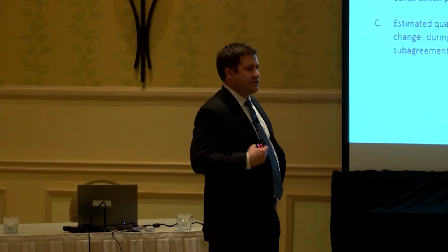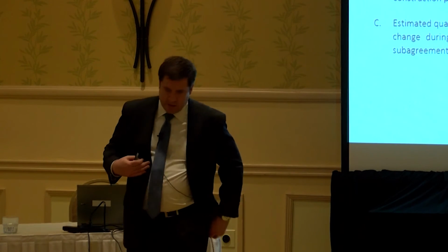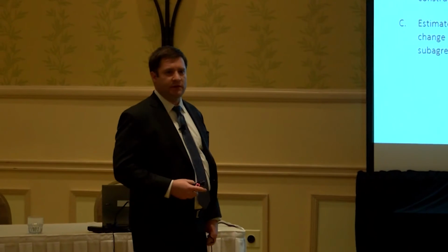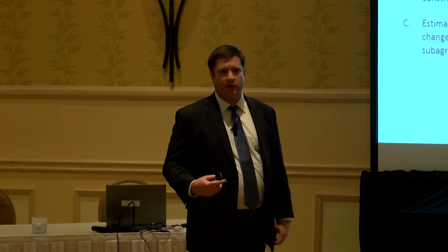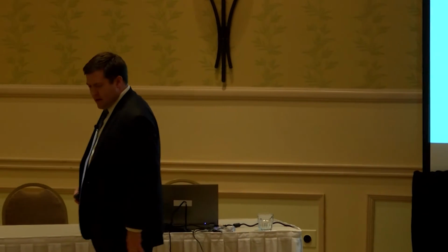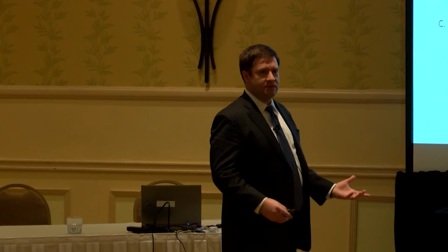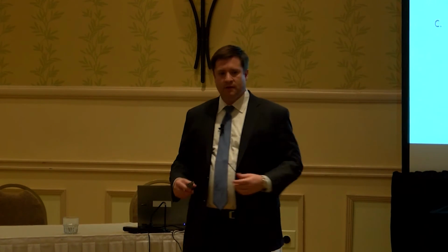One of the other things that we've included in here, which is a big issue that I see when I go to the insurance and legal forms related to the industry, is quantities estimates related to pre-award work and design build applications. Where this comes up is where you're providing an initial 30% design that a contractor's then having to use to estimate his price proposal off of. And as you advance these designs from 30% to 60% to 90% to final, there is always going to be an expectation within the industry that the design is going to change somewhat as you advance it forward.